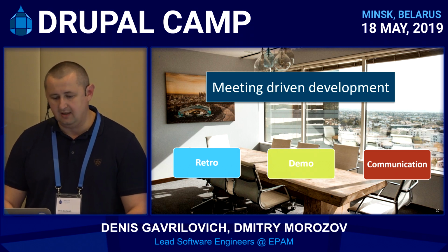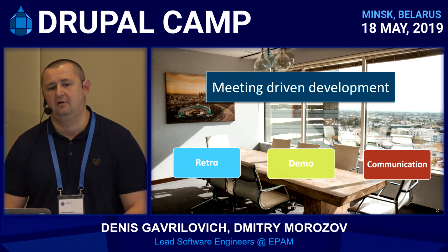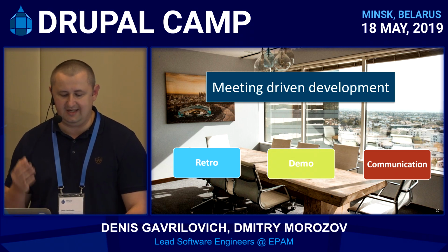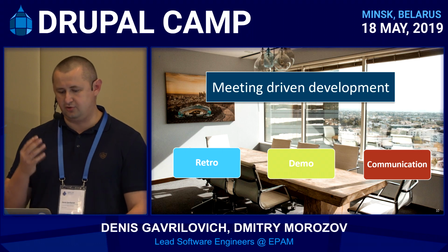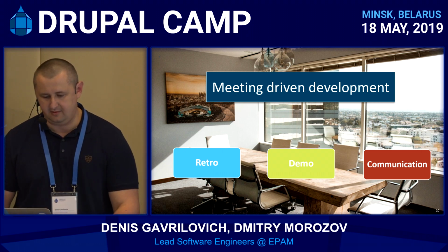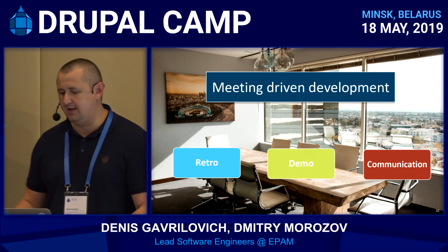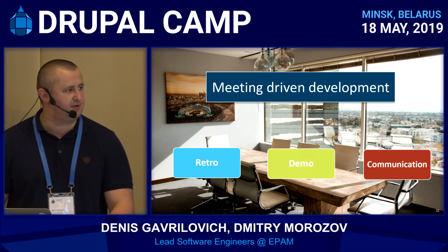Another moment is that it's better to include such retro activities in your day-to-day activities, and you should be able to create a ticket right at the moment when you face an issue, instead of creating it before a session. So it's not efficient.